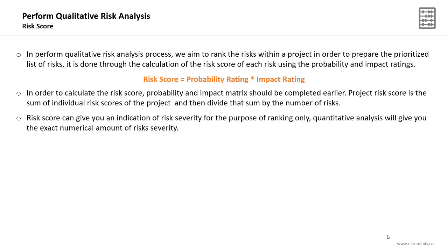Risk score can give you an indication of risk severity for the purpose of ranking only. Quantitative analysis will give you the exact numerical amount of risk severity. Quantitative analysis, mainly represented by the expected monetary value, will be explained in the following section.